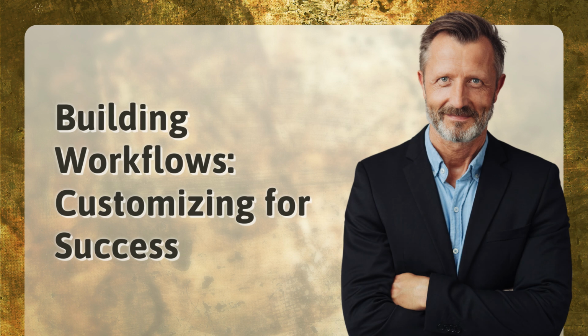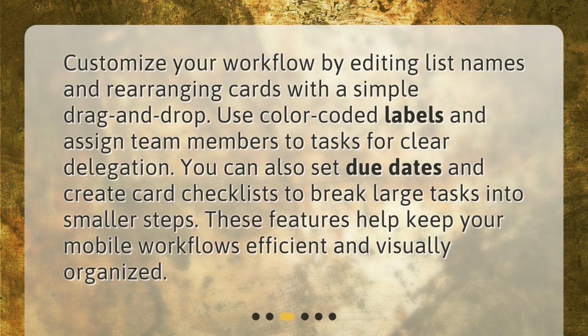Building workflows, customizing for success. Customize your workflow by editing list names and rearranging cards with a simple drag and drop. Use color-coded labels and assign team members to tasks for clear delegation. You can also set due dates and create card checklists to break large tasks into smaller steps. These features help keep your mobile workflows efficient and visually organized.